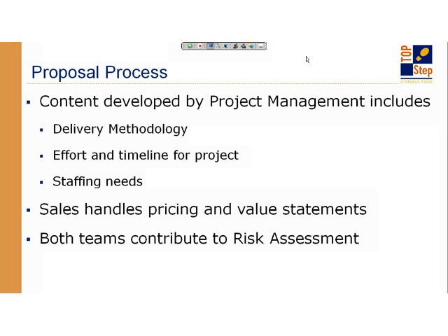But I keep talking about the risk assessment, and the risk assessment is actually where both teams get involved. Sales, having worked with the customer, understands the customer environment, maybe the customer team, and is able to provide information that can be very critical to the success of closing the deal and delivering the project. And of course, the project manager is going to have a somewhat constant set of standard risks that they would evaluate against the project to make sure that something isn't a higher risk than normal, such as a hard deadline to meet the delivery of the project.